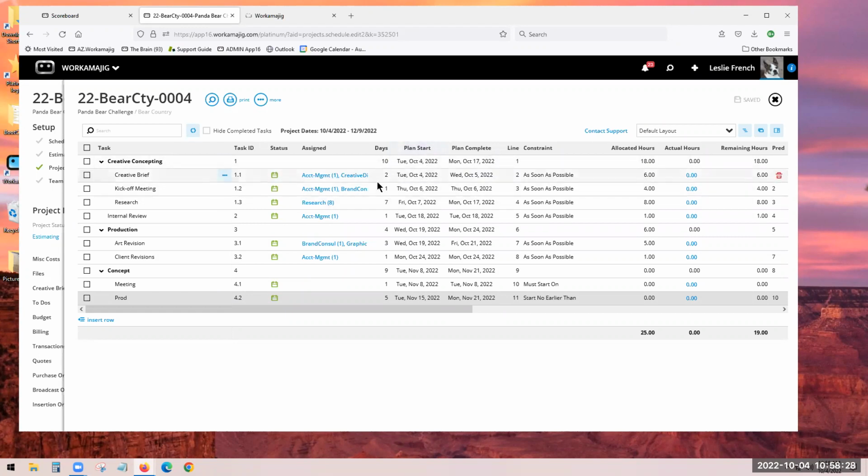Like you saw, when my days don't take 7 days, but they only take 5, the system will then say, well, we get done on Friday instead of on Monday, and it'll auto adjust for you. You've got a 24/7 traffic manager within Workamajig with the way it works for you with best practices. So if you're setting a bunch of constraints, then you've fired that automatic part and you're doing it yourself.